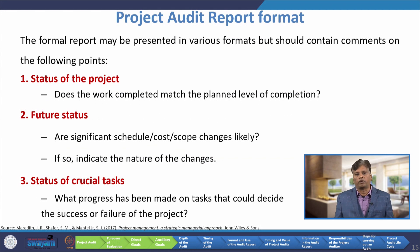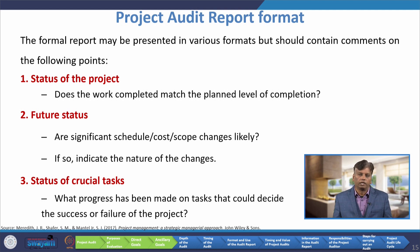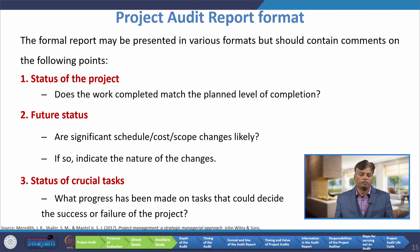Now we will discuss about the project audit format. The audit report may be presented in various formats, but should contain comments on the following points. One is the status of the project — it should mention whether the work completed matches the planned level of completion. Then it has to discuss about future status, including any significant schedule, cost, or scope changes likely, and if so, indicate the nature of the changes. The third point is the status of crucial tasks.